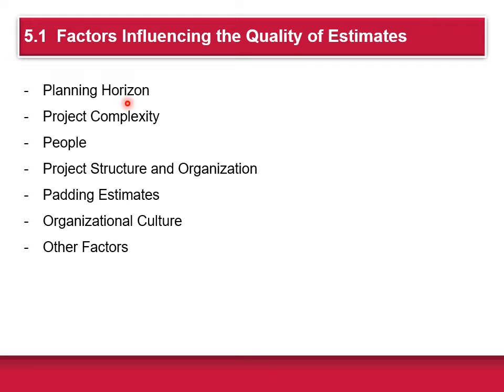Now, imagine how difficult it would be to estimate the total cost of a 4-year transportation project. The accuracy of cost estimates should improve as you move from your conceptual phase to the point where individual work packages are defined. Also, complex projects are harder to estimate than simple projects.